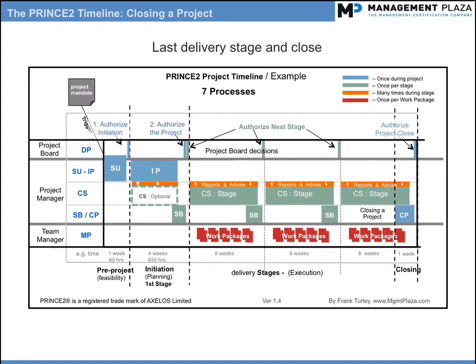Topic: the last delivery stage and closing a project. The project will continue until all delivery stages are complete, and it will be closed at the end of the last stage. A tip: the closing a project process is always the last part of the last stage.